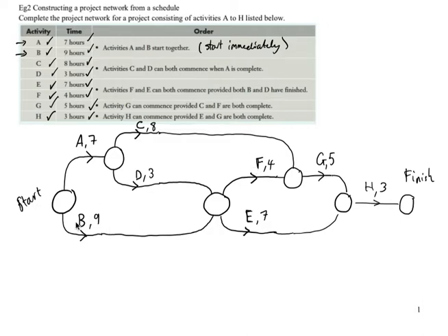Now that we've drawn this neatly, I'll show you why we've done this like this with nice big circles for the nodes. It's so we can do our earliest start time and our latest start time. So we always start at the 0, and then we've got a 7 there, and then we've got either a 9 or a 10. We always choose our maximum.